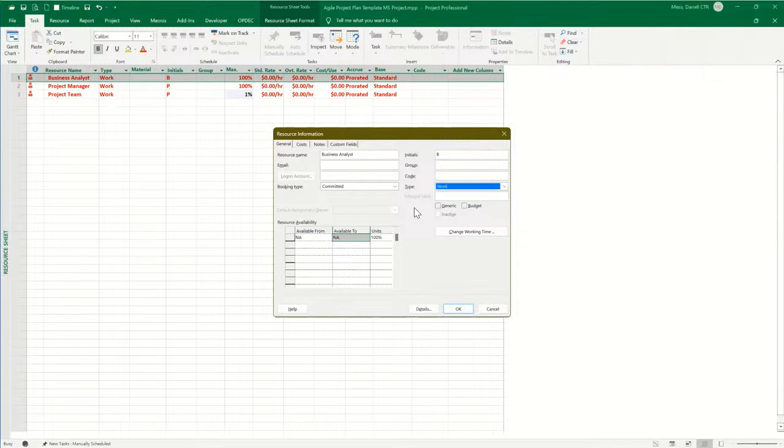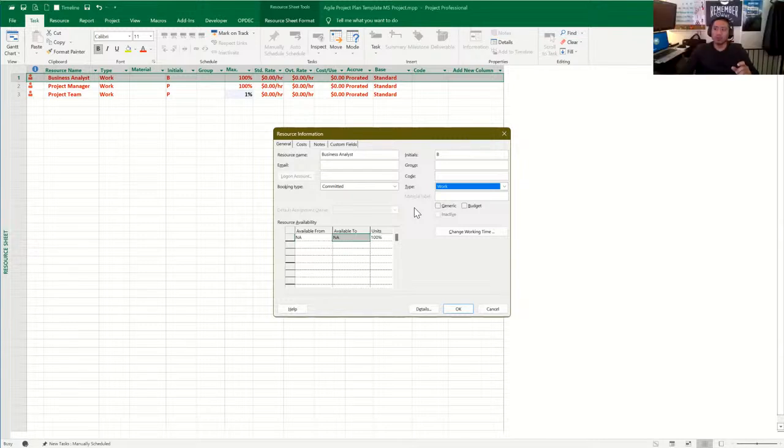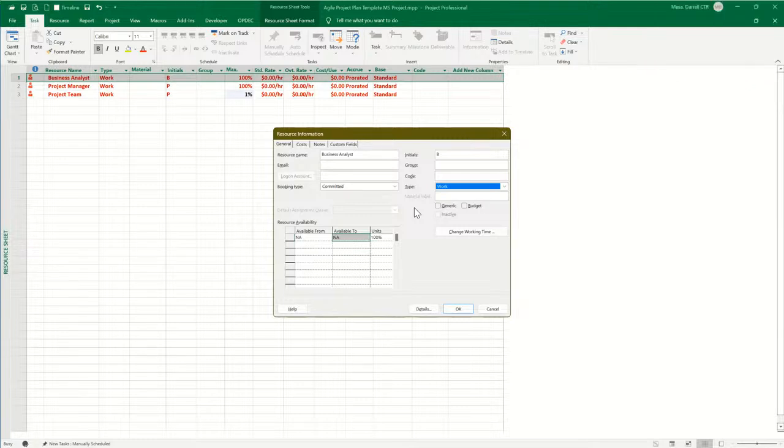Yeah, I understand where you're going there. I was working through some of this, Phil, and that's kind of where I was headed with it as well. So you hit right on where I was at. Because you could use proposed as a showstopper to striking your baseline. You can confidently tell yourself and your stakeholders, look, I am not confident striking a baseline due to having proposed resources only.